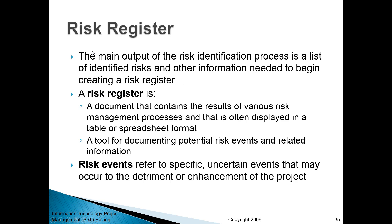Regardless of which idea generation technique you use, the main output of the risk identification process is a list of identified risks and other information related to those risks. All this information is needed to begin creating a risk register — that's the most important ultimate document that is part of the risk identification process. A risk register is a document that contains the results of various risk management processes and is often displayed in the form of a table or spreadsheet.